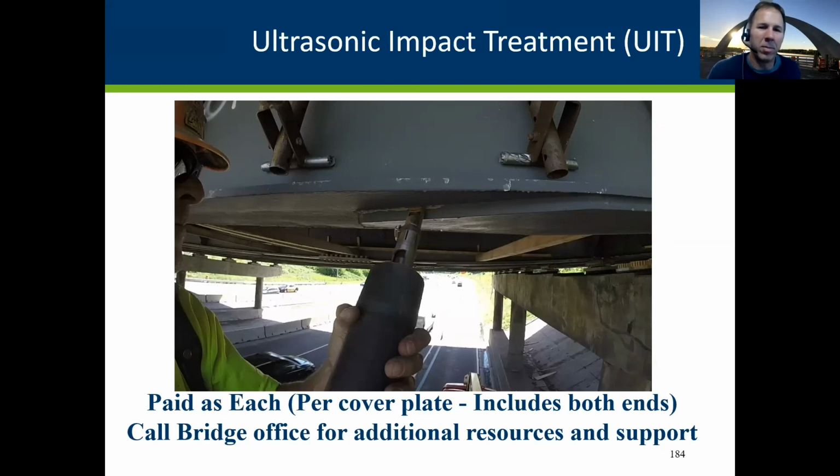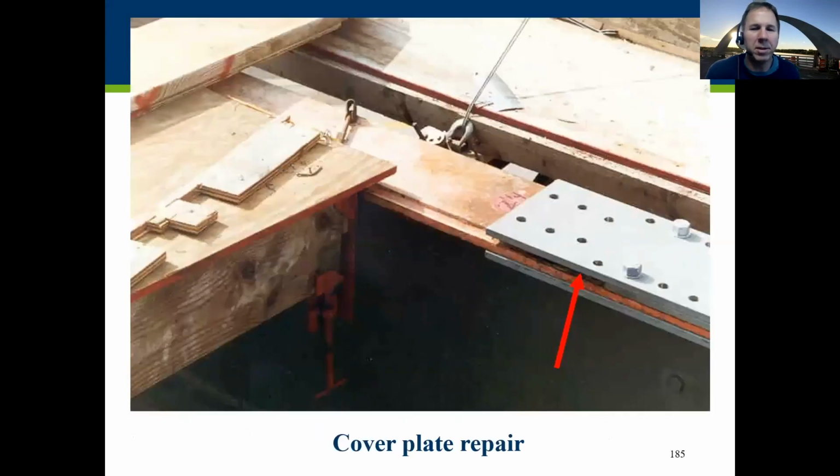But some people are certified in it, and we can look them up online whether they've maintained their certification. Here's a cover plate repair, what that might look like. It comes out with some fabricated plates that are ready to be drilled through the existing flange. So we'll detail up one of these assemblies in the bridge plan for bidding purposes, and then it becomes a field ordered quantity.